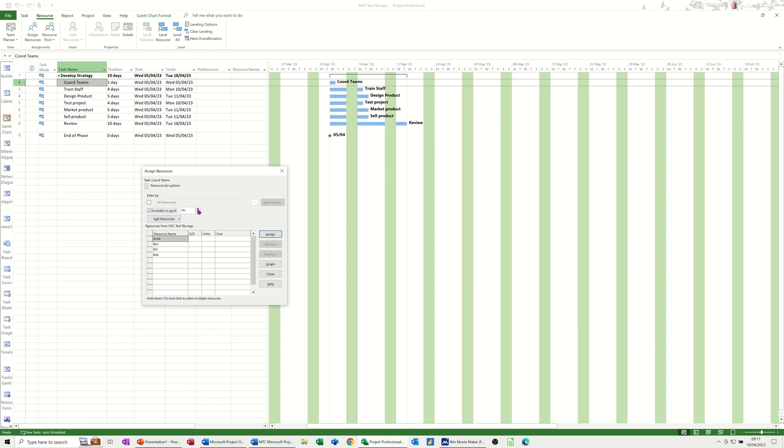If I start moving this past eight hours to nine hours, none of those are available to do nine hours in that one day because of their calendar - their work time is only eight hours a day, that's what it's set to. So you can use this to see who's available. I'll assign Ann to this one, so she's on this task.